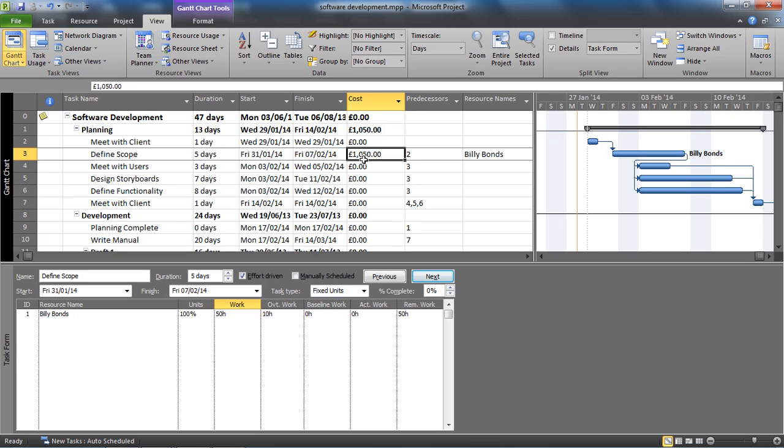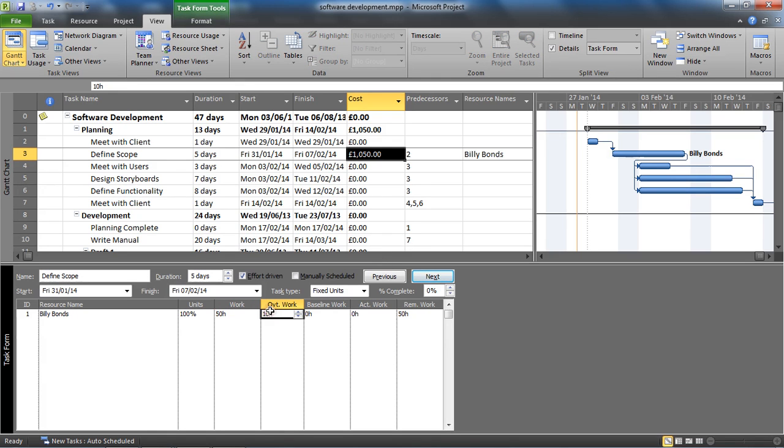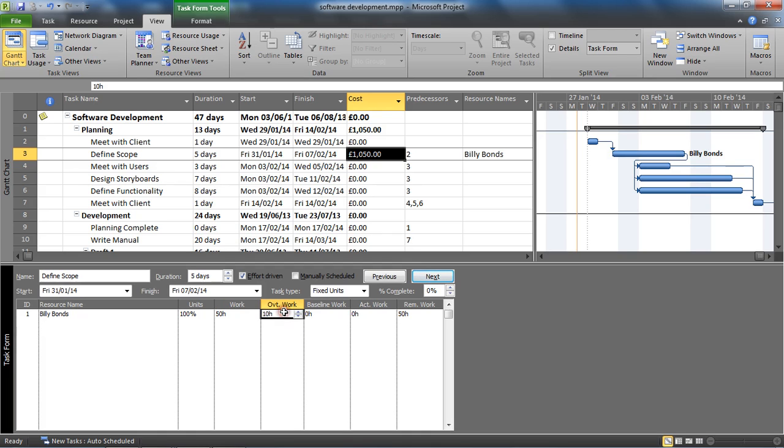So that is overtime being used. You have to enter it manually. One way you can do it, probably the easiest way, is the task form in this split view. Just bear in mind that the work is inclusive of that, so Project decreases duration, which is quite a natural thing to do. But if not, make sure you change the work figure as well.